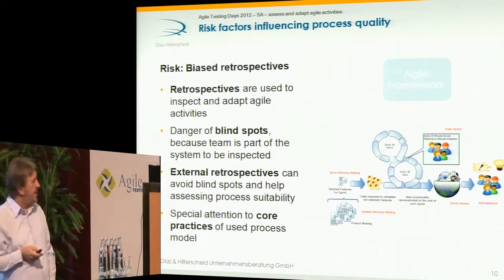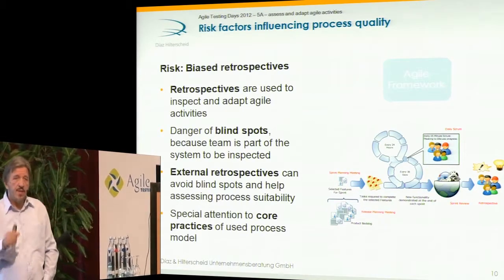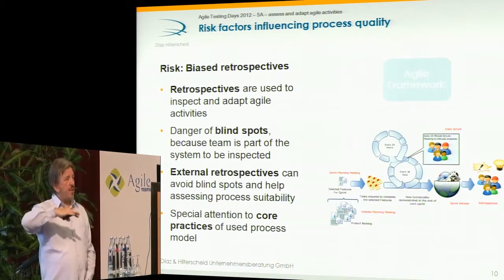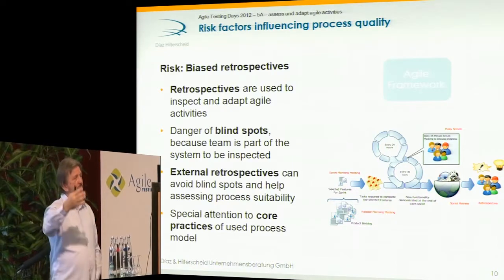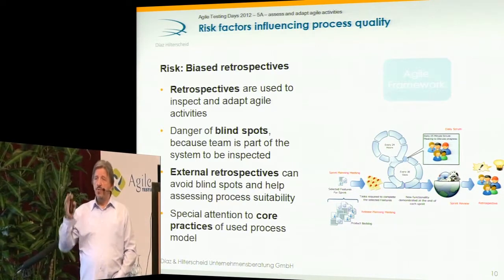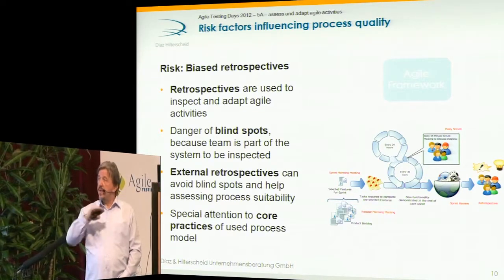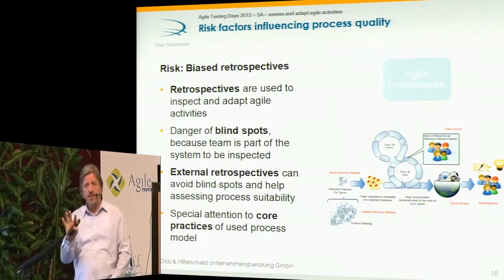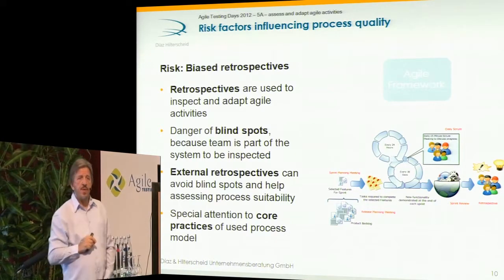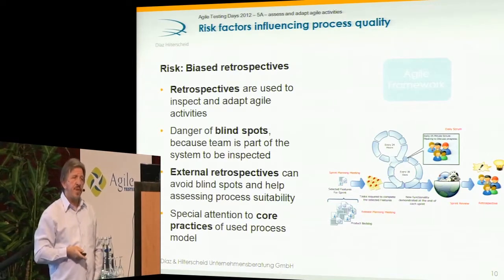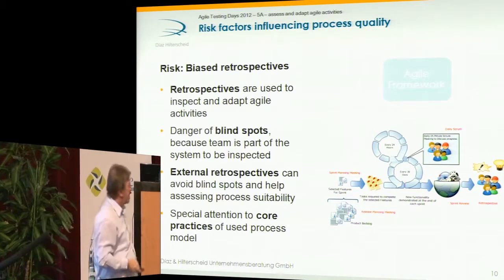Well, I can tell you now, the reason behind that was that the retrospective was used by their former team leader for controlling them. So he was always attending the retrospectives, and he was using that data from the retrospective to command the team as well as he could in the new role. And that is what they were trying to avoid. But again, that was not obvious. It took us some time to find out the reasoning behind that.